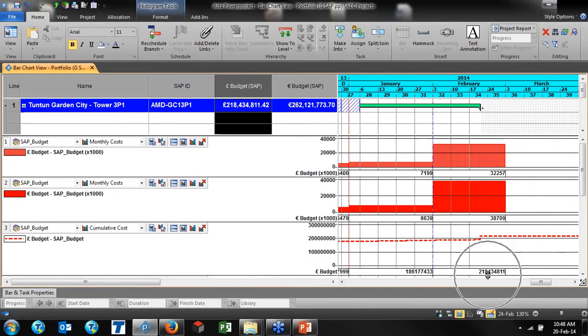It will be matching with this data because it is cumulative, and it will be matching with this budget data. And here I just simply multiply with 1,000 because it is nicer numbers, easier to read. And here I am just showing the overall, and the same budget costs I am showing in monthly, I am showing in different currency, I am showing in the cumulative cost.